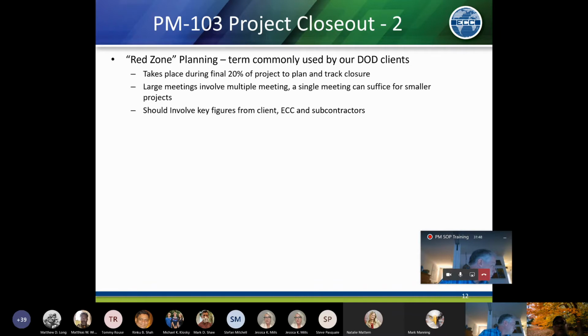We do have a checklist developed at the beginning, but sometimes over time that may fade from memory. So definitely that 80% mark is a good time to get on it again and make sure everything is checked off and everybody walks away completed.